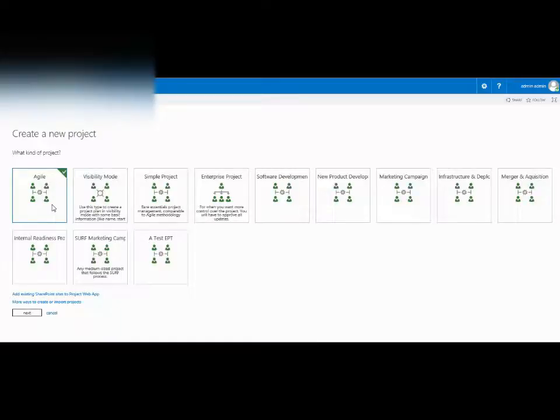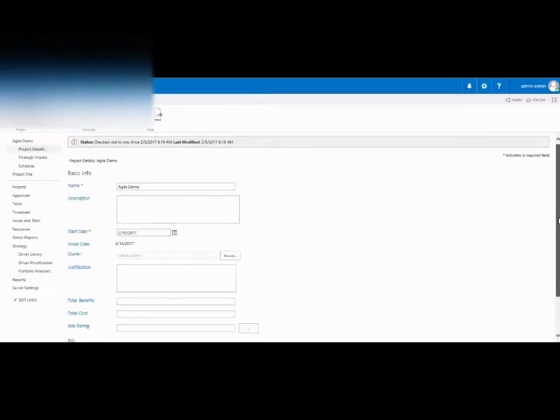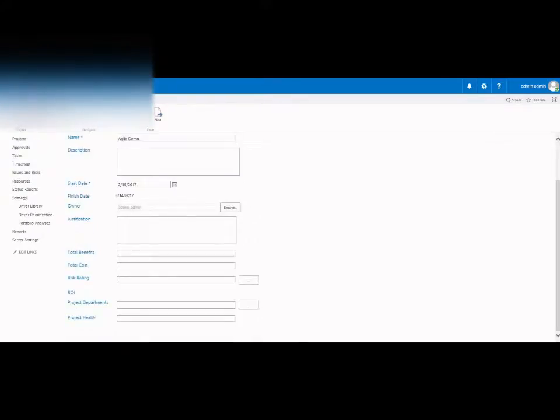call a user story. In passing, just a small note, a user story is not a type of project, it's a functional increment, so we can make do that Microsoft names these selections as enterprise project types. We give a user story a name, provide a start date, and any other fields of information associated or required so that we may facilitate our reporting needs later, like with a burn down chart.